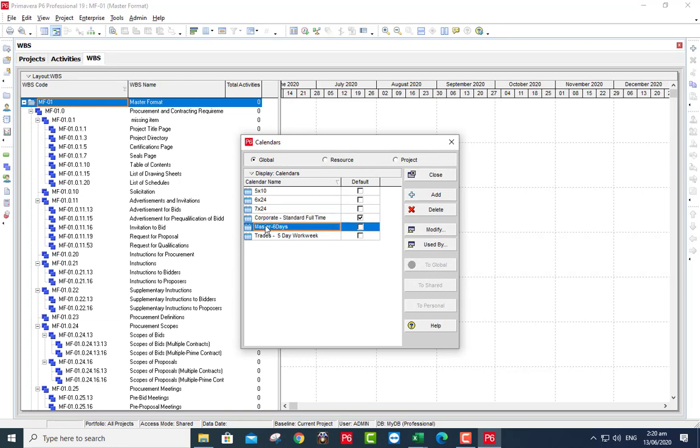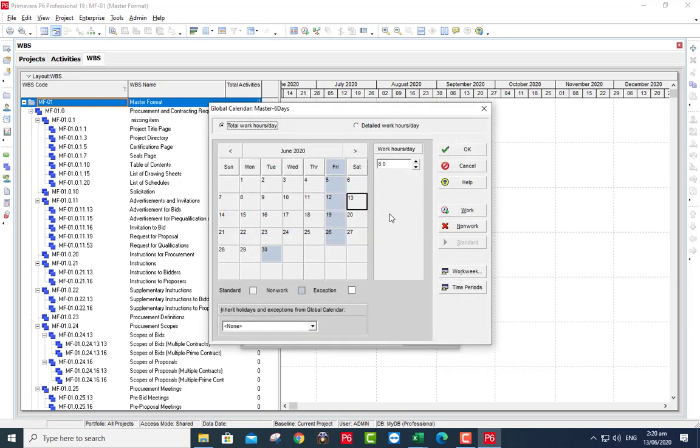This master 6 days. It's Friday as a holiday, no work, and I suppose the end of any month is official holiday. This is 30th June. Here 31 meet or cross the weekend, so it'll take the next day. Check. Okay, this one.